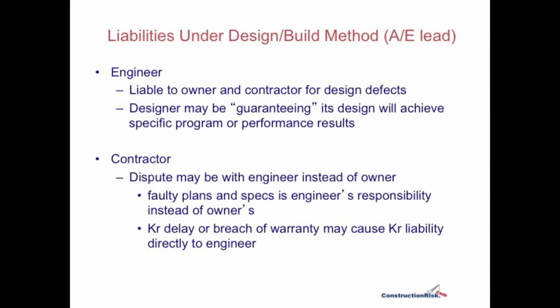So in this case, the contractor might argue that it's entitled to that implied warranty of the specifications, not from the project owner, but rather from the design professional. And in that case, it may not even need to prove negligence or breach of standard of care on the part of the design professional. So again, you have to be very careful of how your contract language reads in that contract between the designer and the contractor to determine what legally is going to happen there.